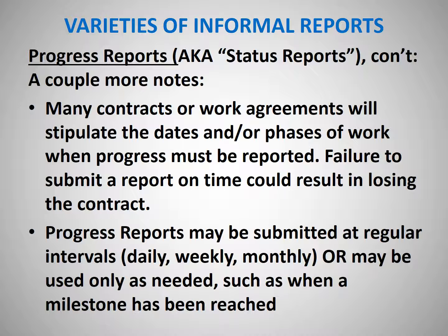But that would be a milestone at which you would say, okay, we've accomplished this research. Then to actually implement what you learn may only take a short amount of time. So your milestone would be 2 weeks from now. So it doesn't always have to be on a regular basis. It could be based on when you think the most important things are going to happen along this timeline.